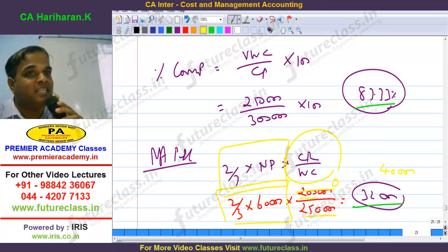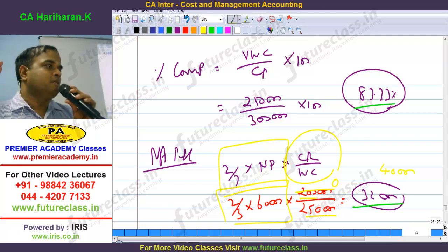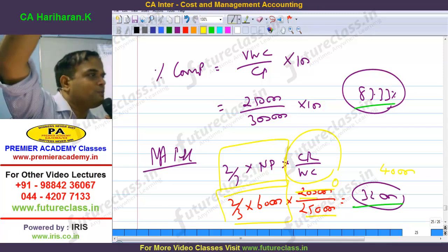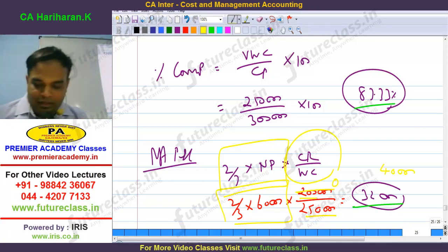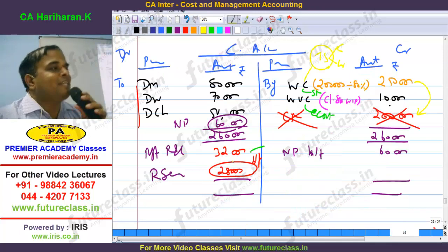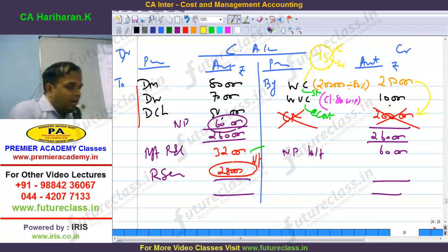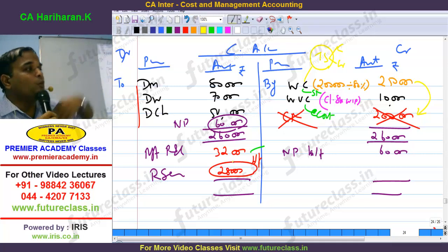Further we are downsizing the notional profit income. That amount only we have to recognize in the P&L account. How many of you understood? Are you able to appreciate that or not? Therefore, balance money we have to transfer to reserve. Next year, assume I am completing the full contract. Next year profit and reserve of 28, everything I am going to enjoy.